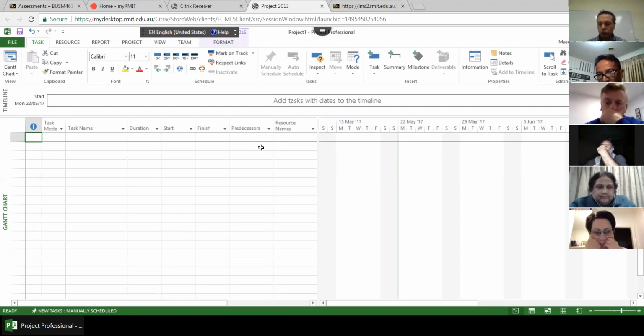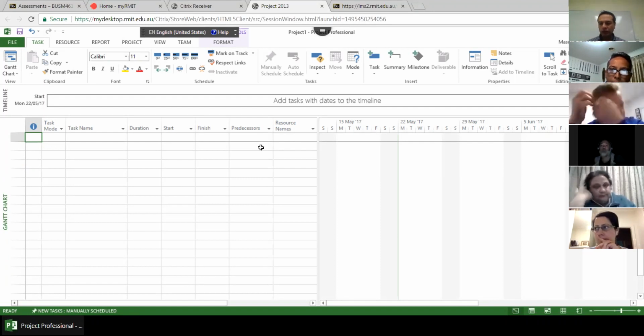And you should be able to estimate the activity duration yourself. But the software will help you to visualize your time schedule and make other plans. And further on, you make your progress and compare it with the baseline that you will make. So don't expect that the software thinks on behalf of you.